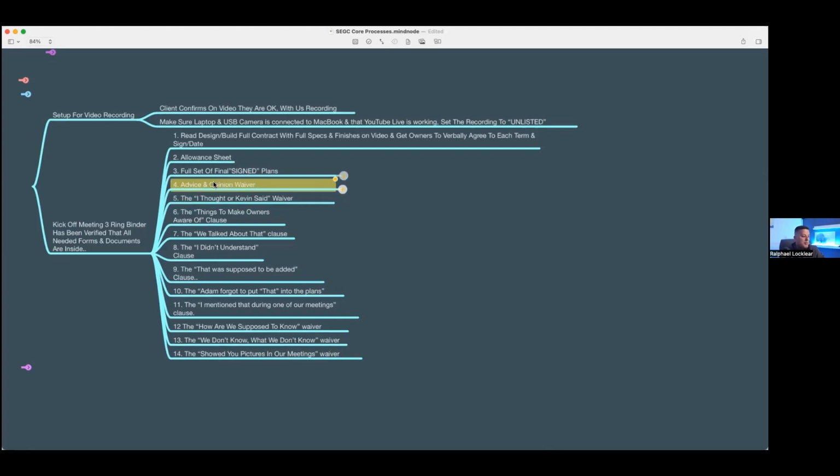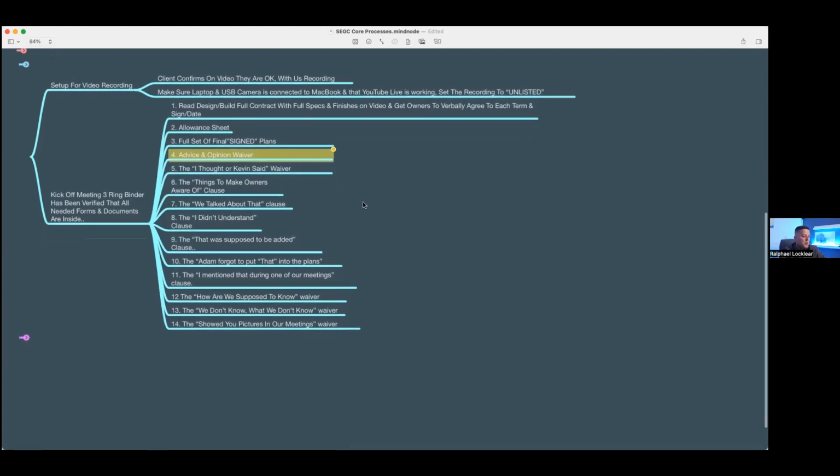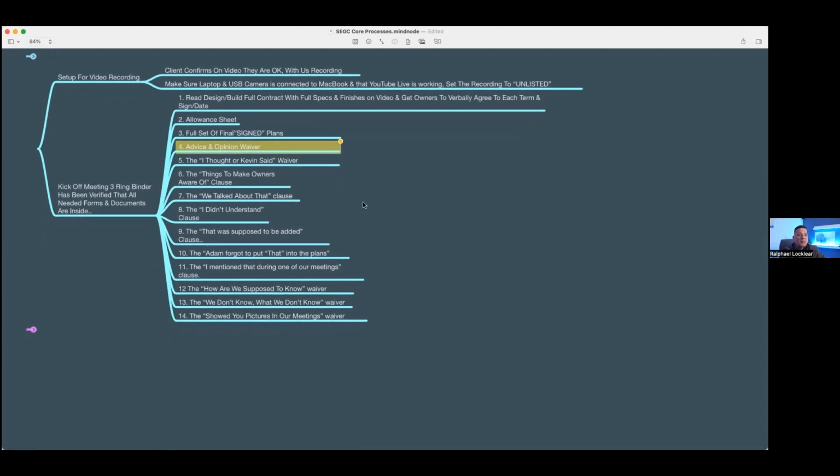We've got different things. I mean, what is this? Advice and opinions waiver. Because sometimes we've been asked for advice or opinions, and we've given them. And guess what happens? When that advice or opinion didn't meet a desired outcome or expectation, all of a sudden we're held financially responsible for that opinion on a selection that we gave.